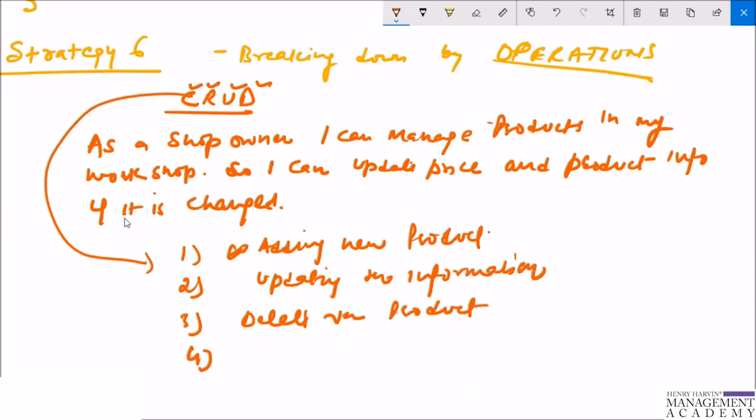So next is, for example, as a shop owner, I can hide a product so that I can not sell them for the time being, right? So when presented with this strategy, many teams wonder if the smaller item actually delivers business value. After all, what's the point of creating entities when you cannot update or delete them afterward? But perhaps the product owner has such a limited number of products that editing or deleting can be done in the database directly.